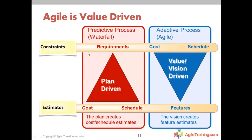Traditional processes like waterfall incorrectly assume you can fix your requirements and scope — that's what plans and agreements are built on. But when you fix scope, what ends up changing is cost or schedule. Agile says: instead of being so plan-driven and fixing requirements, just tell me your cost or your schedule. If you have a specific budget or a drop-dead date, tell me that, along with high-level requirements, and we'll constantly focus on the highest-value requirements to deliver.